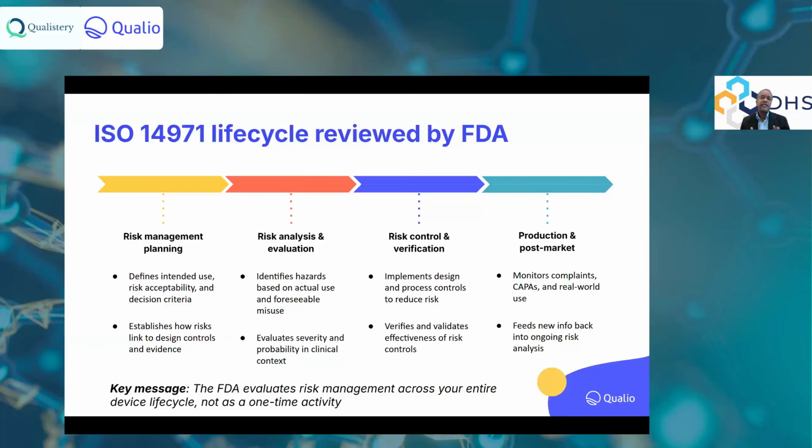So once that analysis is done, DFMEA, then you go ahead, design iteration of the board, your product, etc., and then do V&V. And the same goes for post-market surveillance. Key message, FDA will review that you have applied risk management across the entire life cycle, because guesswork and intuition may get you close, but not all the way there. And they want to make this objective, right? Maybe you have an amazing engineering team, but how do they know? They would know by reviewing your documentation.